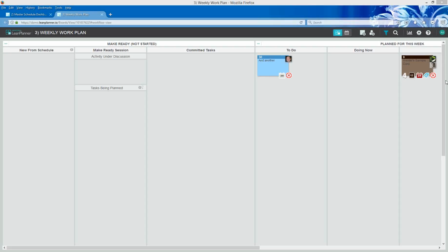Yeah, the question I had there was, if you develop a project in Microsoft Project, the scheduler, then you have a bunch of activities. It's all based on critical path method. Once you update, the scheduler itself does a lot of goofy things, and the activities get moved based on the predecessors, successors, and all the relationships. Based on my experience, if you take Microsoft Project to a granular level for all the tasks and activities, it almost becomes impossible to manage.